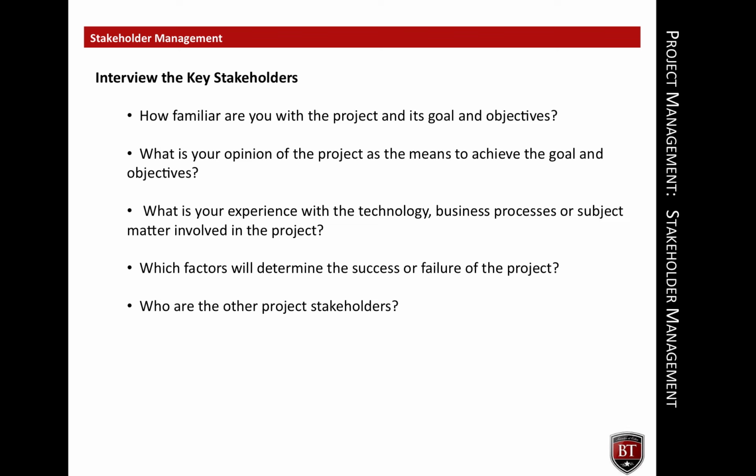What is your experience with the technology, business processes, or subject matter involved with the project? This question may uncover expertise that you can leverage. Which factors will determine the success or failure of the project? This question will help identify project requirements and project risks. Who are the other project stakeholders? This question will identify stakeholders that may have been overlooked.